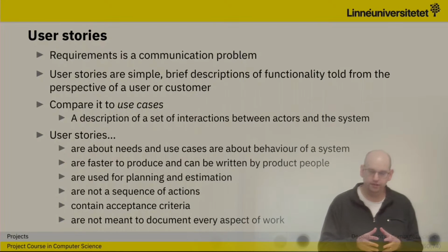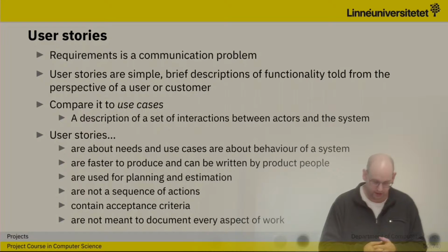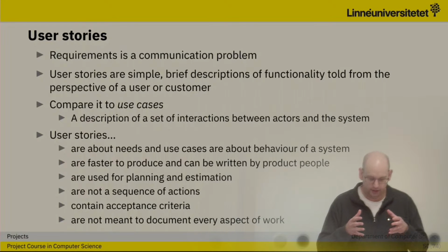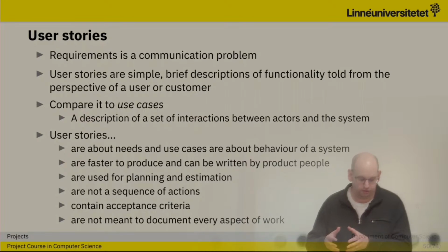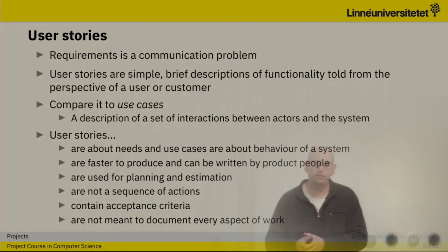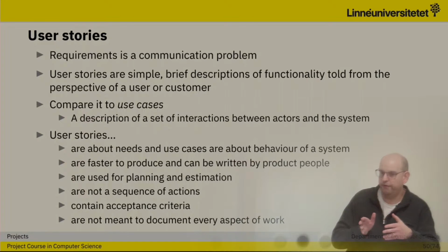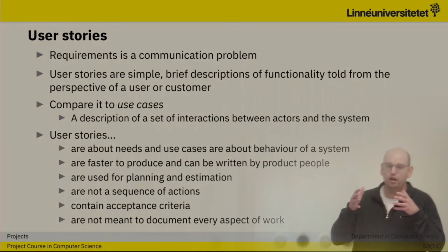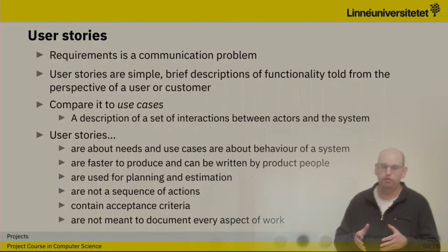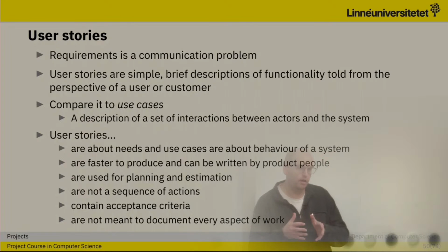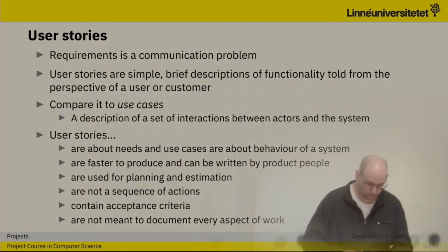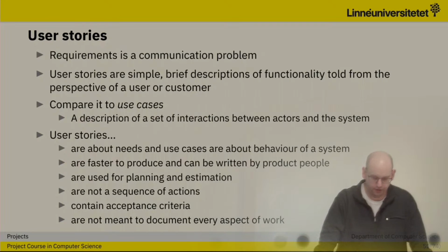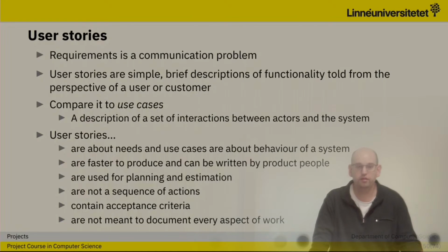However, user stories, which we are more interested in, are about the needs that we have in the system, whereas use cases are about the behavior of the system. So these are different perspectives on the same thing, where the needs are much easier for the client to describe than the behavior of the system. They are also faster to produce, and they can be produced by the product people, namely those who want this product.